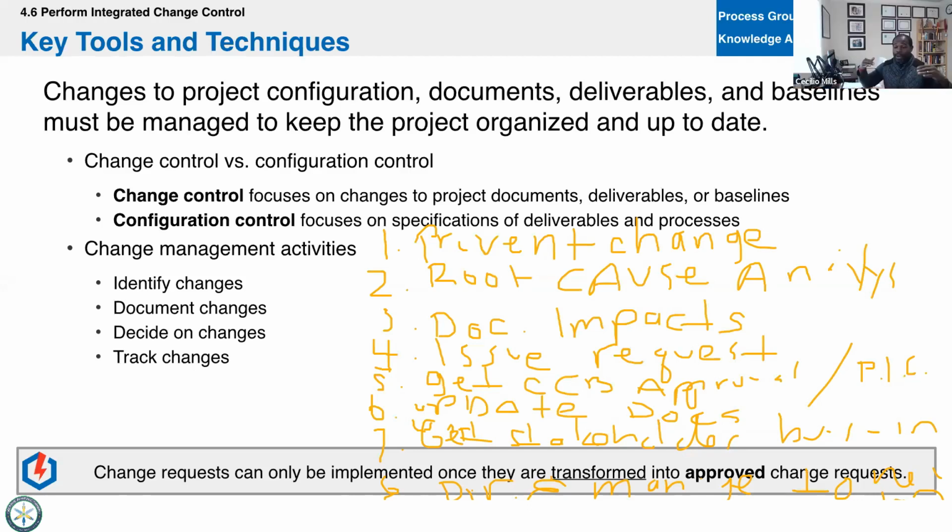From the PMI standpoint, in the paragraph of the question, it told you that the change was going to take so much longer or cost so much, right? And you only need one of the four: cost more, take longer, add to the scope, or increase risk. Usually the exam gives you two. But as long as one of the four is there, that means the impact has been documented or analyzed. Now you can issue the request.